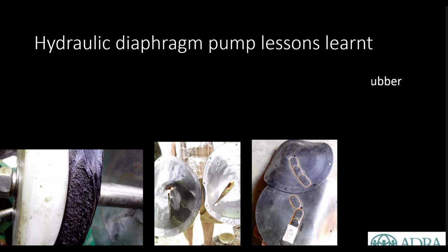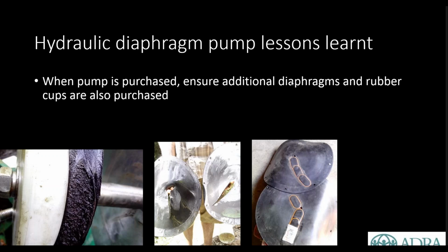But one of the lessons that we did learn is that we need to ensure that additional diaphragms and rubber cups are purchased, so that when things do go wrong, they can actually have them at hand. We did think they would last more than a few weeks, which is what was happening here. We thought we'd have a bit more time to set them up before we needed some replacement parts.